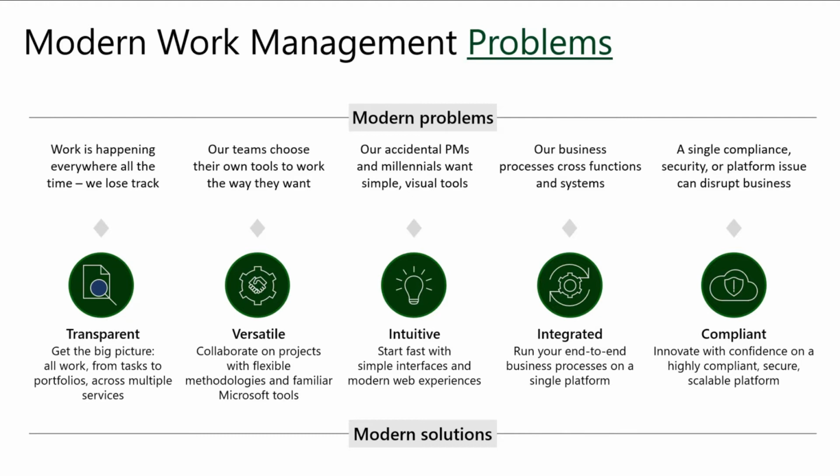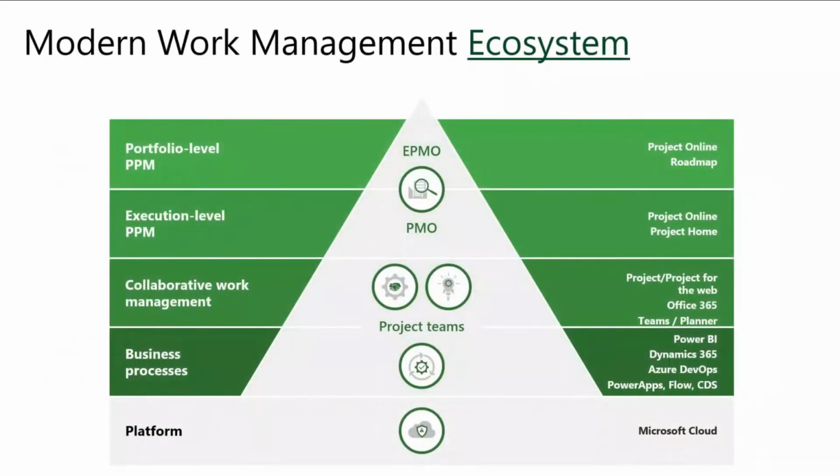So if I was to say three things across these tool sets, just really high level: if I want to deal with structured projects and resourcing, I'm going to be at the execution level. I might be doing Project Online, okay? If I'm going to be doing a lighter weight project, whether it's structured or not, and I want some quick visibility, and I'm not too worried about resource over-allocation, they can manage their own. I really want this to be a task management and visibility tool. Then you choose Project for the Web.